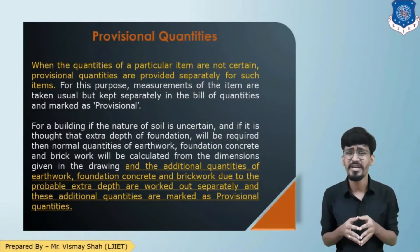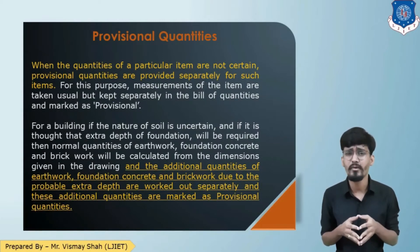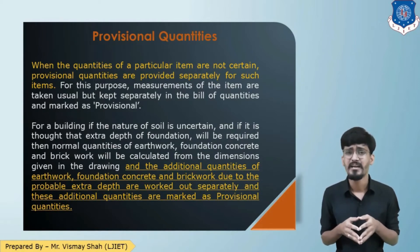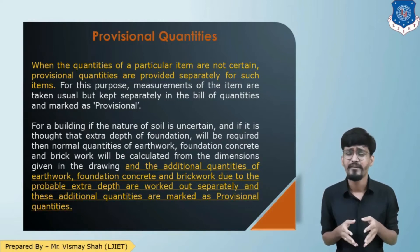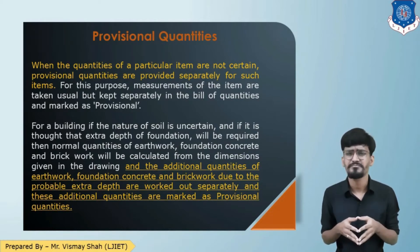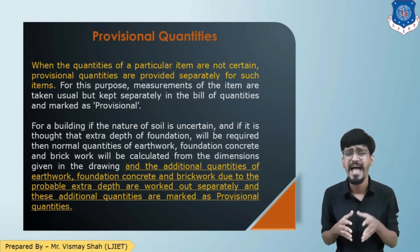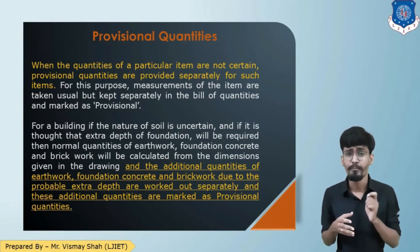The next is provisional quantities. When the quantities of certain items of work are not very accurate or certain, provisional quantities are provided for such items. For this purpose, the quantities are calculated and kept separately, marked as provisional quantities. For example, if the nature of soil is uncertain and it is thought that extra depth of foundation is required, the additional quantities of excavation, foundation, PCC, brickwork, and masonry are calculated separately and kept in the estimate marked as provisional.